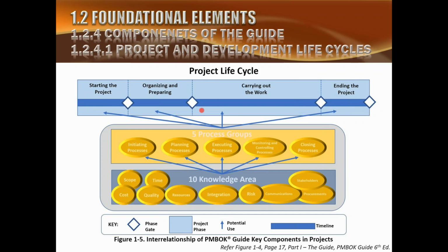Now, this theory completely changes when we go to the iterative model, when we go to Agile. In Agile, all the iterations are actually the phases, and there are 200 phases, and every iteration is of exactly equal size. If the iteration size has been fixed to 2 weeks, then every iteration will be 2 weeks, and there will be maybe 200 iterations going on.